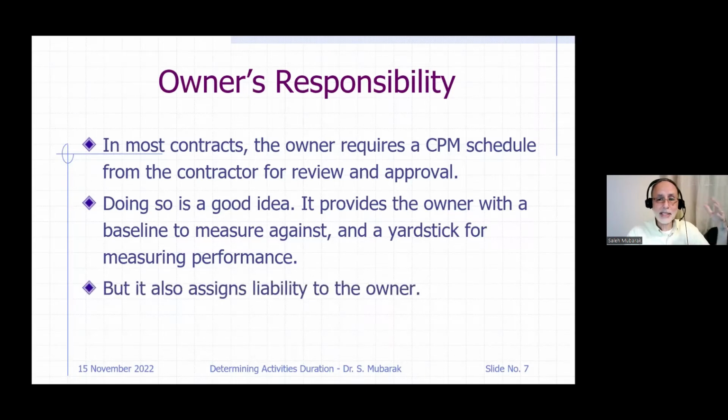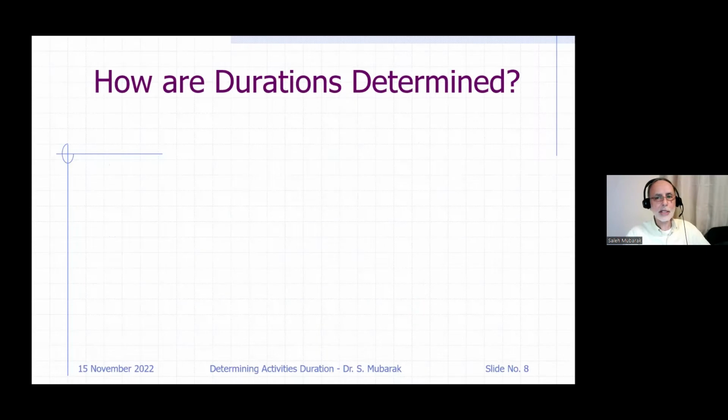So it does not mean that it relieves the general contractor from the liability. And I've said it many, many times. Take the schedule, Mr. Contractor, take the schedule seriously, because nothing wrong may happen for 4 or 5 months, and all of a sudden something hits, a claim, a dispute, a change order, and all of a sudden there is a dispute and the reference is the schedule. You cannot say, I didn't mean this. What you mean is what we see on the schedule.